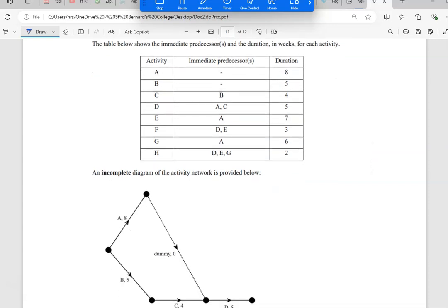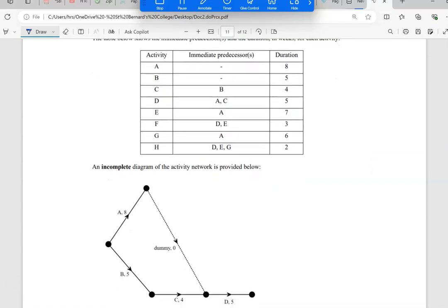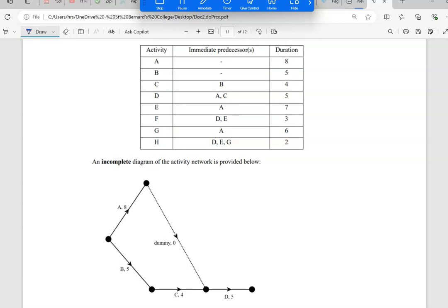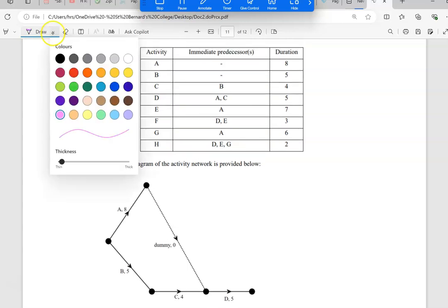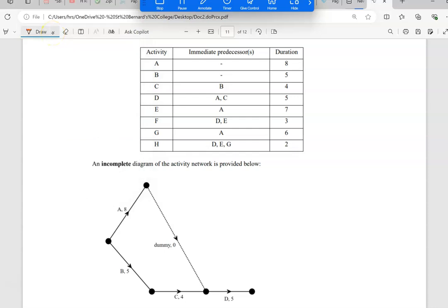And the first activity is asking us to draw the network below. So what I wanted to bring to your attention is how we find the dummies again. If we remember, we can see we have A by itself, but then we also have A together. Remember we said when we have that, it means there's a dummy, and the dummy comes from the letter by itself.